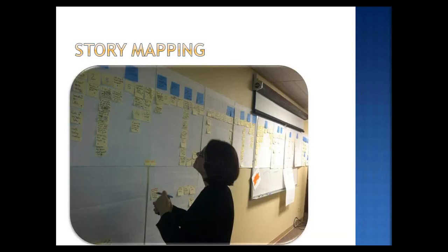All right, back to it here. So then you would take that information that we had created in that story map, and we would expand it out and start creating stories. And this is that same team that you saw that was doing the licensing thing. They had over 200 stories that they created for this product, and we created something called a story map to help them understand it. And this took 3 days full-time with about, I don't know, 8 to 12 people that were working on it together at the same time.